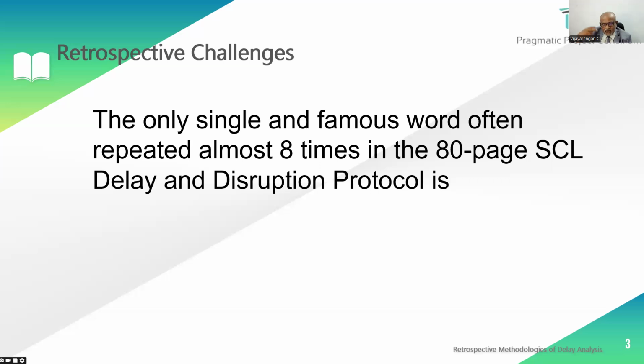When he started asking so many questions, he needs a lot of assumptions, he needs to create lots of assumption logs. At one point of time, when he is concluding the report, the assumption log has to be closed. He needs to get an answer, and appropriately the assumptions need to be closed.